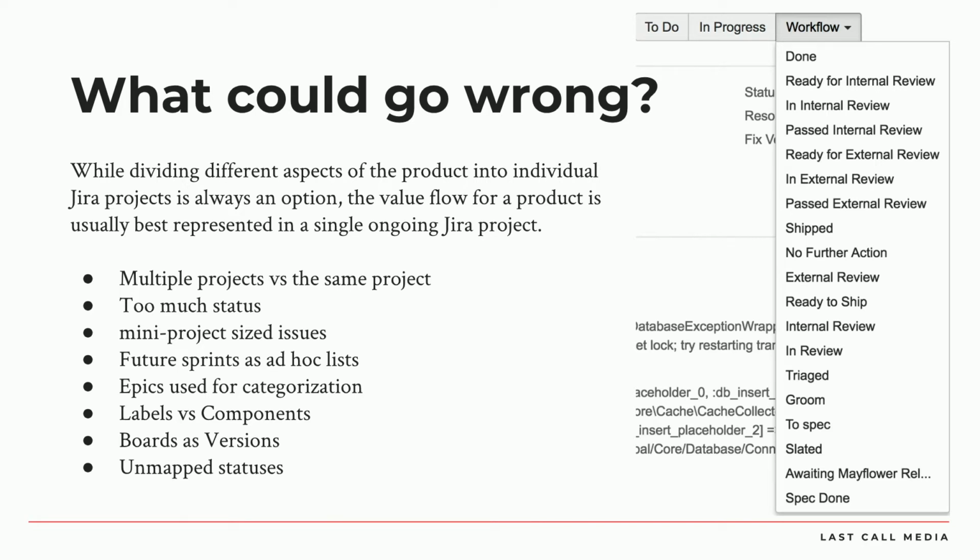But it's really flexible, right? You can have a board for any query. So I've seen where people are thinking about the next batch of work that they're going to do, and it's common to think, okay, we've got this next batch of work, we kind of know roughly what the issues are, let's do a query for those issues and make a board for our next batch of work. So they do that batch of work, they finish it, then that board just sits, and now they're going to do their next batch of work, so they make a new query and a new board. That's kind of a misuse of boards.